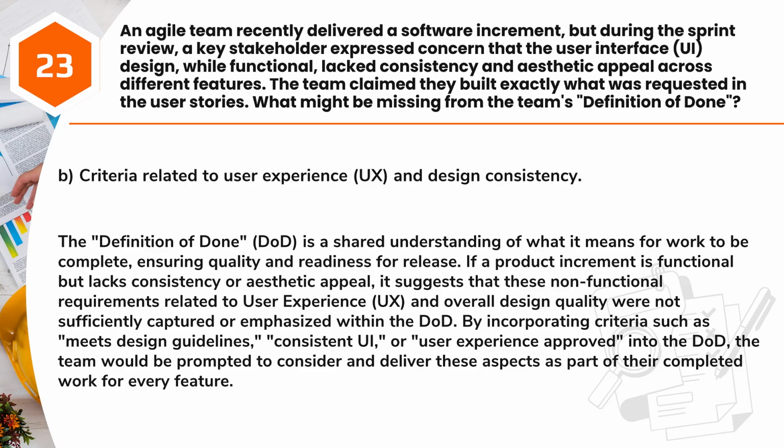By incorporating criteria such as meets design guidelines, consistent UI, or user experience approved into the DoD, the team would be prompted to consider and deliver these aspects as part of their completed work for every feature.